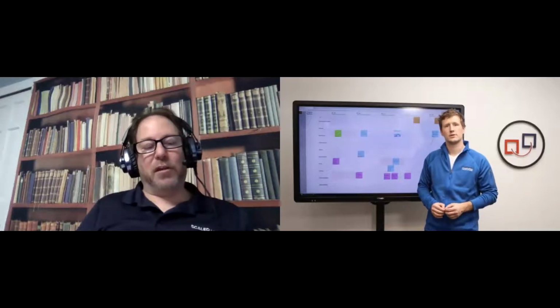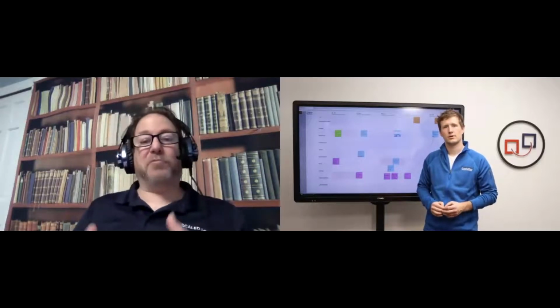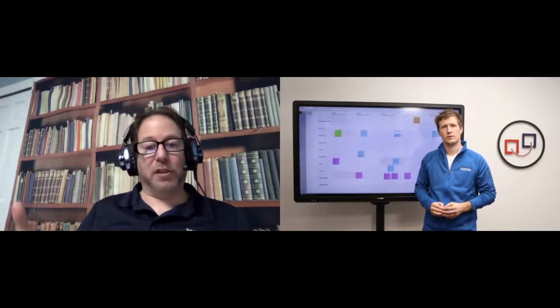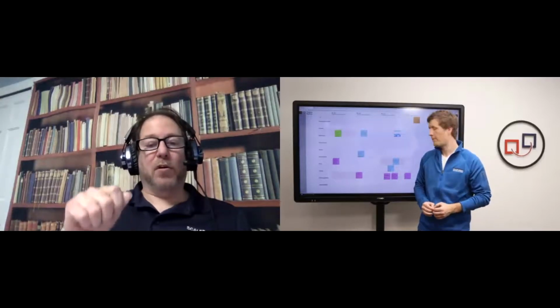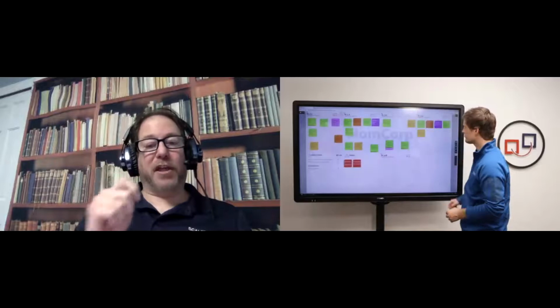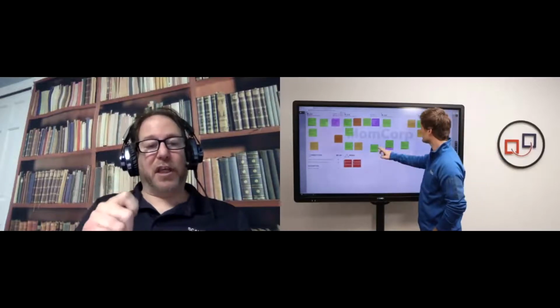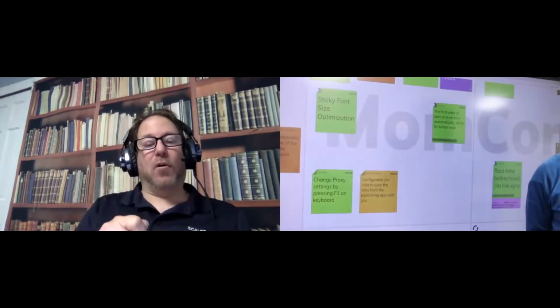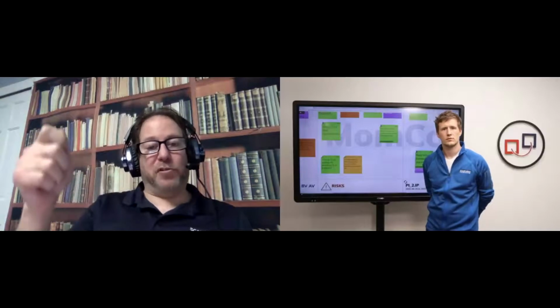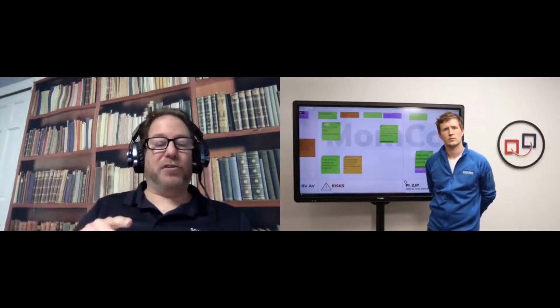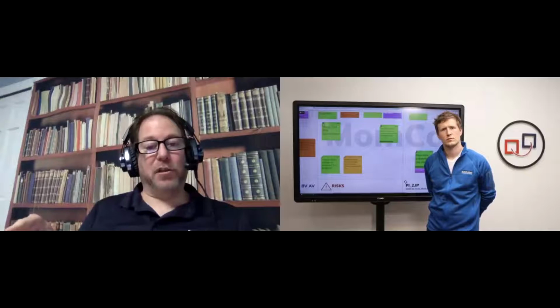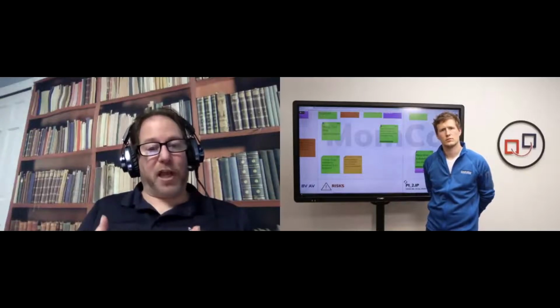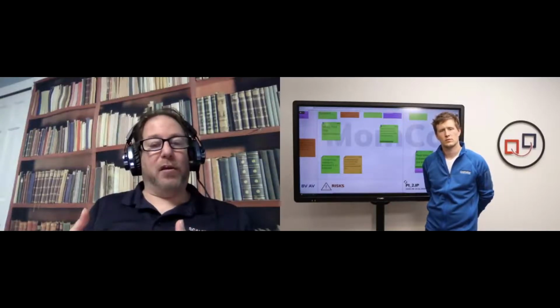Right. So typically on the team's iteration planning boards, we normally will put some indicator on a sticky that we have a dependency that we need to resolve, whether it be on that feature or a story that contributes to a feature. And then we need to go to the other team and have a conversation to figure out how we're going to work together, and then agree, okay, how are we going to resolve this dependency?